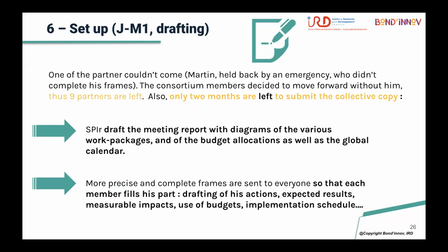It was held in Lisbon, but one of the partners couldn't come for various reasons. The consortium members decided to move forward without him. During this meeting, Aspire drafted the meeting report with diagrams of the various work packages and the budget allocation, as well as the global calendar. All these different aspects were discussed during this meeting.